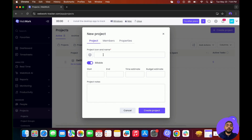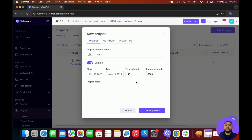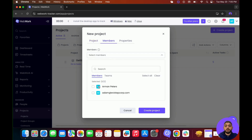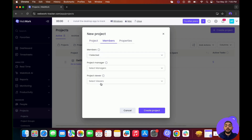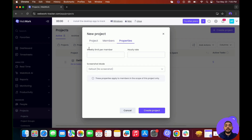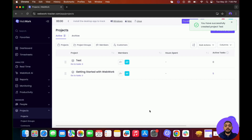Here you'll be able to add the name — for example, I'm going to write 'test.' You can choose if it's billable or not, put a deadline, for example starting Monday with a deadline of Friday, add a time estimate of 40 hours and a budget estimate of $1,000. You can also add project notes. To assign members, click on the Members section and choose the members you want — for example, I'll assign myself. You can also add project managers and project viewers. In Properties, you can set the weekly limit per member, the hourly rate, and the screenshot mode. To save, click on Create Project and the project will be created.